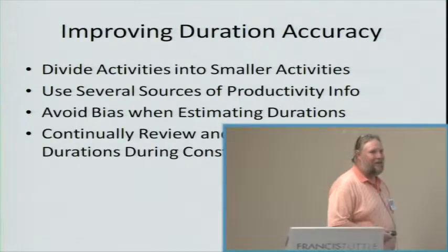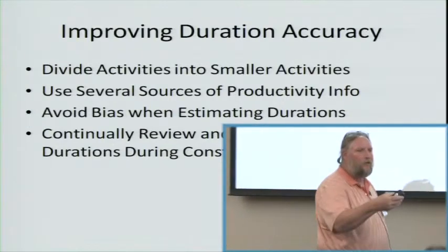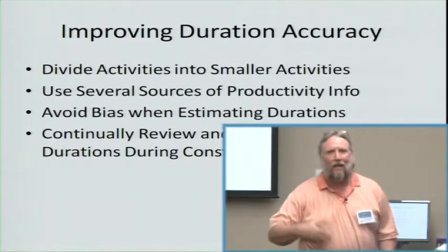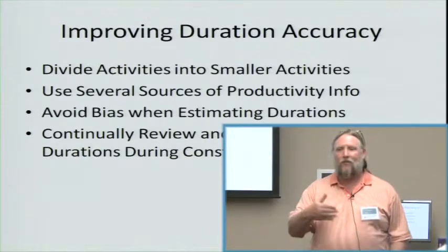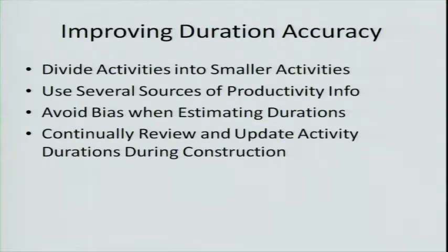If you use critical path, wouldn't that eliminate that? Well, not if you put that into the duration. If I skewed my duration and added an extra 5 days into it, it may put that on the critical path that says there's extra 5 days there that's not really there. Or if I biased it the other way, said, you know what, we can actually do it faster than that.